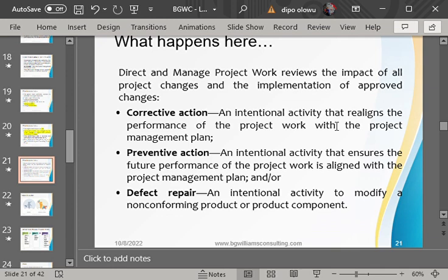Okay, so maybe for instance in a task or assignment or activity to be performed, you now discover, oh, you're supposed to use 6 inches block here. Why did you use 9 inches? Person can tell you, sorry, I forgot. So what do you now do in that case? Because it was either you or the team member or the supervisor who are part of the team that discovered it, at that instant a corrective action is used.